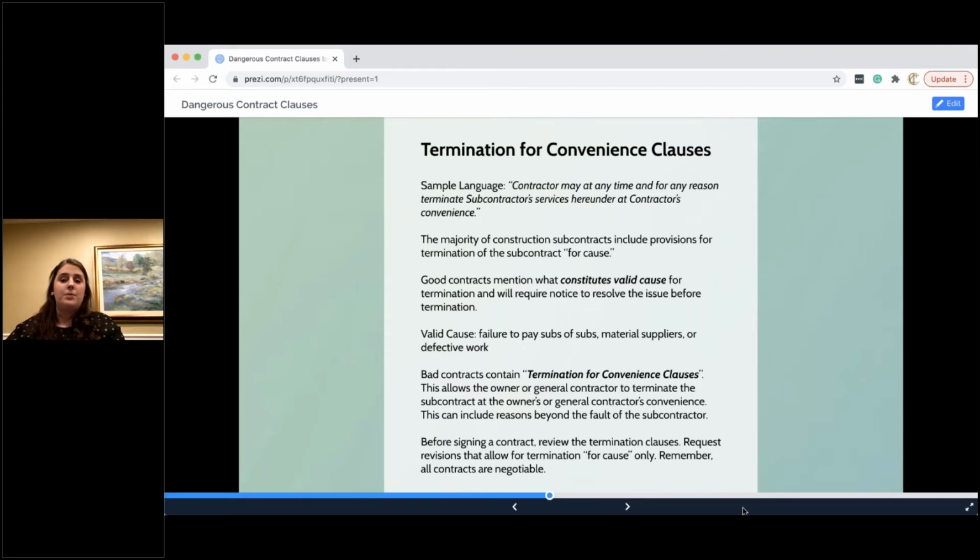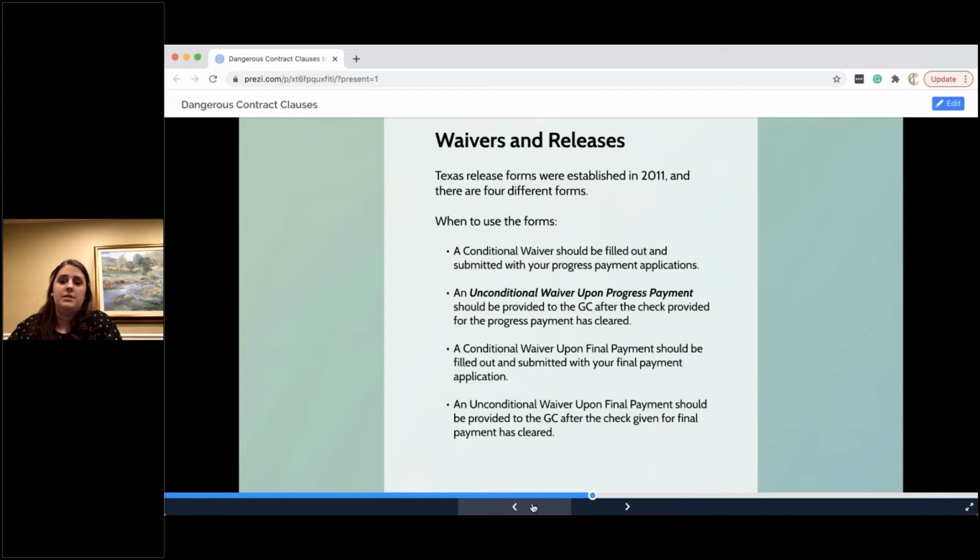And so that is the period where you would go in, like we just talked about, fix the issues so you don't have the back charge, and you fixed it so now you're not terminated because you stepped up, you did the job, you responded to this notice, you were kind of put on warning. This isn't just they woke up on the wrong side of the bed, don't like you anymore, you're off my project. It gives you some sort of protection to know that you're going to continue to be employed on this job. Not only that, it prevents all the other consequences that may flow from being terminated from a project. There can be a lot of them. Back charges was just one of the ones we talked about. So look for termination for convenience clauses.